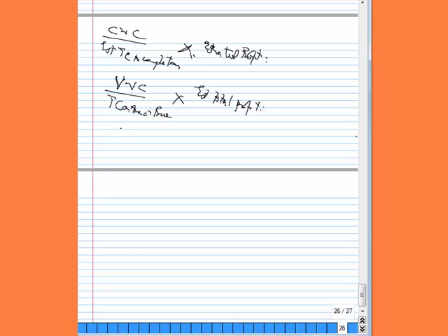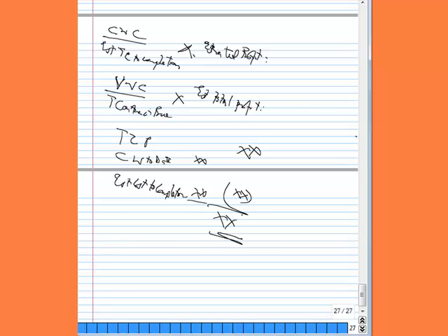The estimated total profit is the total contract price minus cost of work to date and then estimated cost to completion. That's the total cost, and this will give you the estimated total profit on the contract. So the profit to be recognized per period is based on this formula. That's the percentage of completion method.